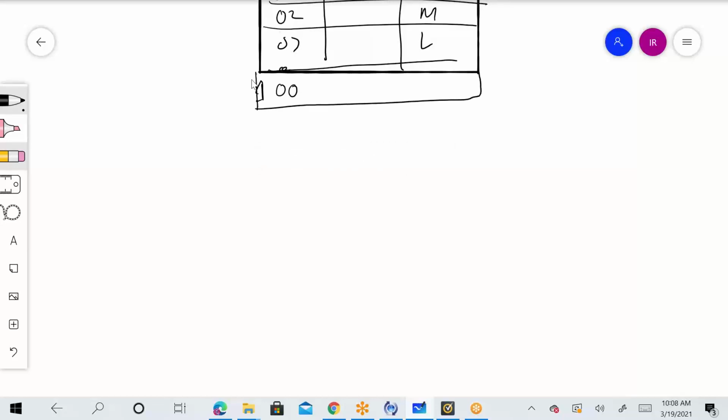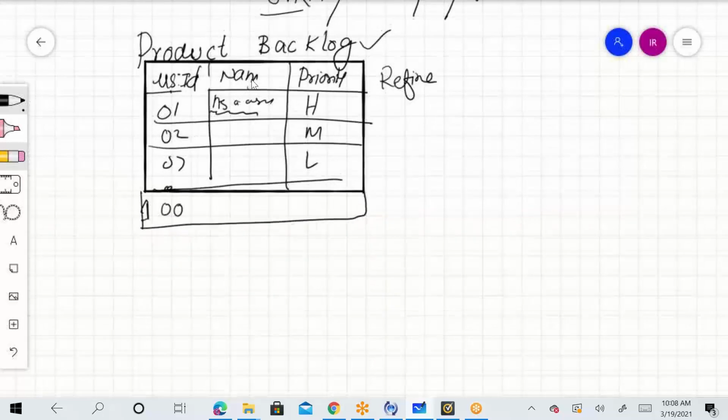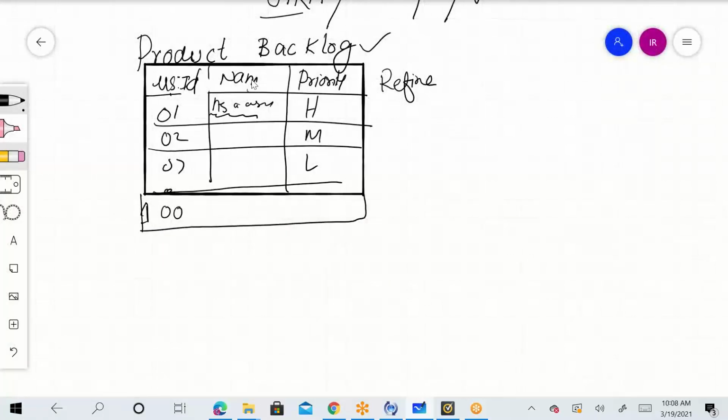No, priority is not based on story points initially, because story points are assigned once you're actually going to go for your development, which is your sprint planning and sprint estimation. At that point of time, user stories are given the points or number of hours, and then it is defined. But definitely it has an indirect link.